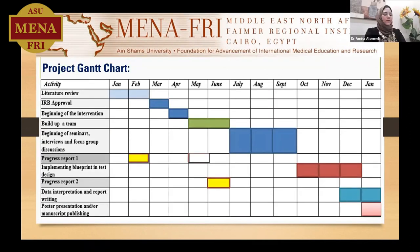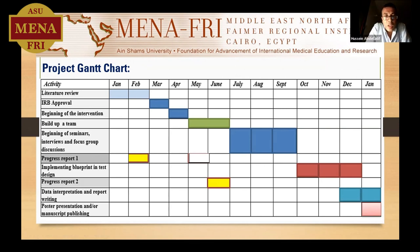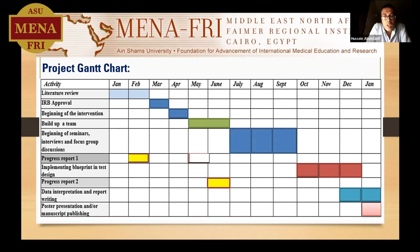The project began by reviewing the literature in January and February. I then applied for IRB approval in March, and in May and June I started the intervention by designing a test blueprint and building up a team. This was slightly delayed due to modifications in the college's learning schedule. I then began presenting seminars, interviews, and group discussions, held during July, August, and September.